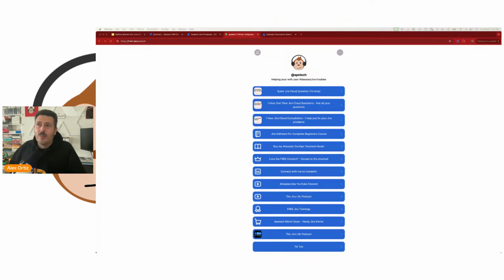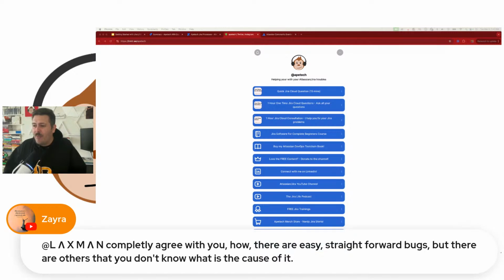So you want to do some homework. You never just want to toss a bug to a developer and say go figure it out. You should have your developer and the person who found the bug talk before anybody commits to fixing it. That way you have more knowns.